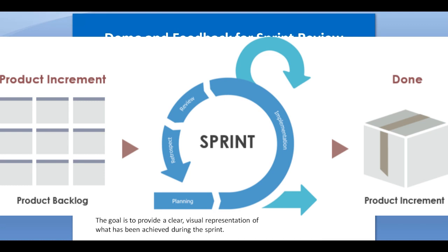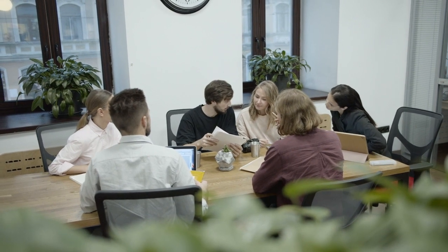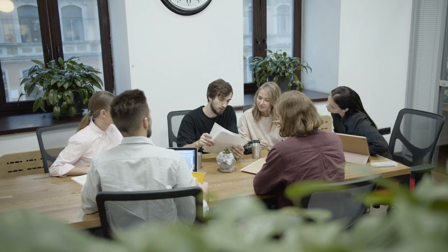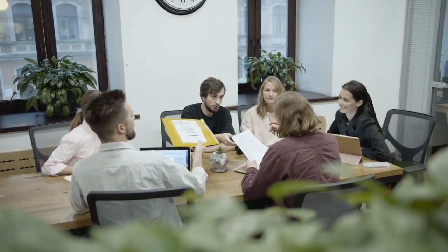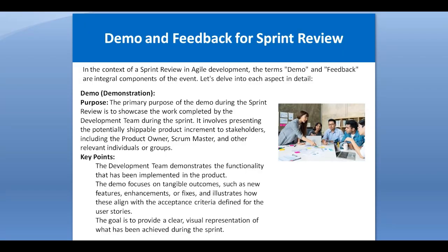Key points. Friend, the development team demonstrates the functionality that has been implemented in the product. The demonstration focuses on the tangible outcome. Tangible outcomes means the working functionality. Remember that demo means the actual working functionality. That means the application is actually integrated with third-party software, and it is getting data from the database. So features, enhancements, and fixes are basically in working condition and as per the acceptance criteria defined